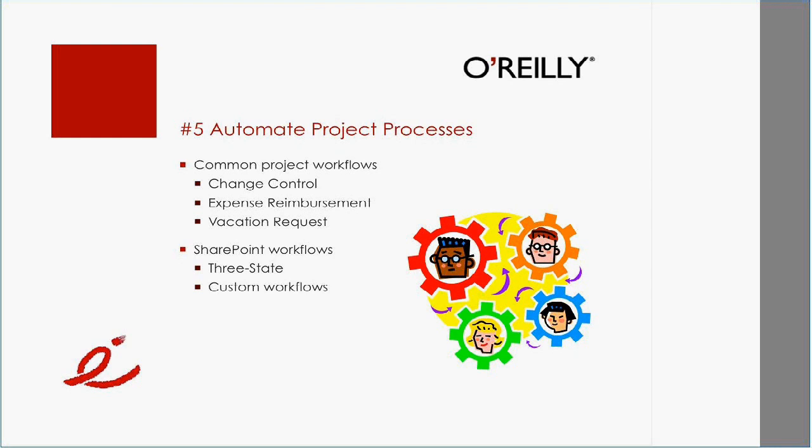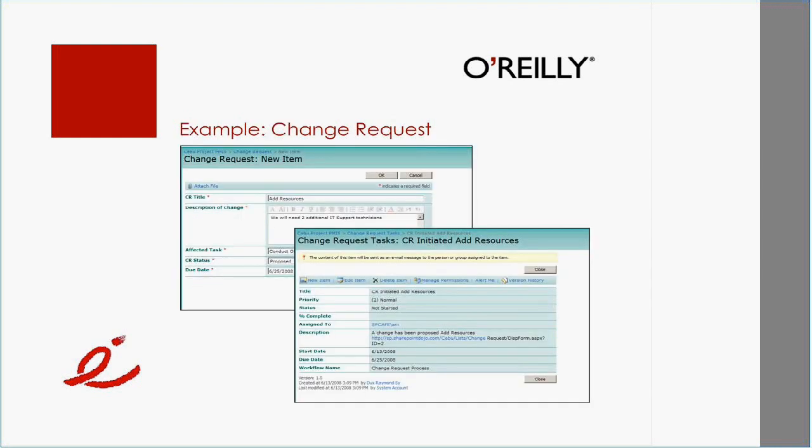It doesn't require programming. Here's an example of what's called a change request workflow I built in SharePoint, and again, no programming, where a user comes in and he or she can fill in a change request form, and what happens is once the change request form gets submitted, it goes and contacts the project manager. The project manager will confirm that he or she receives it, then it moves on to the next state to the change control board.